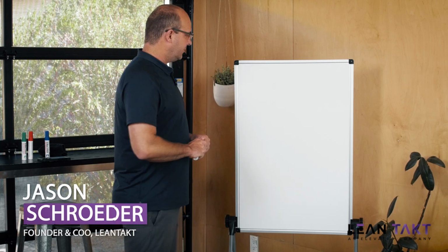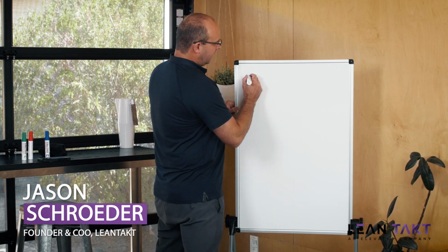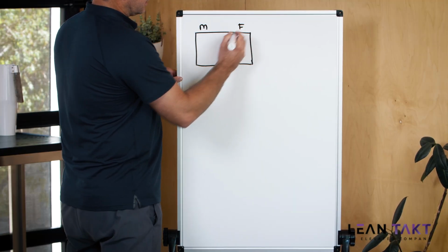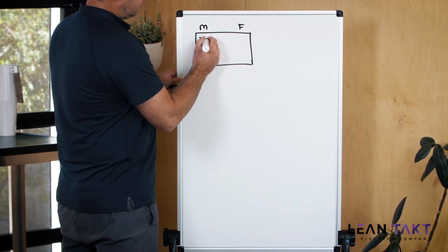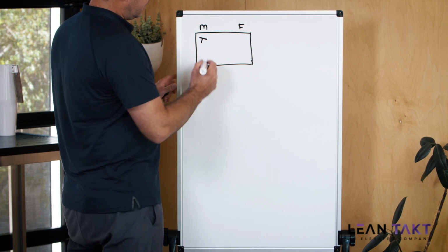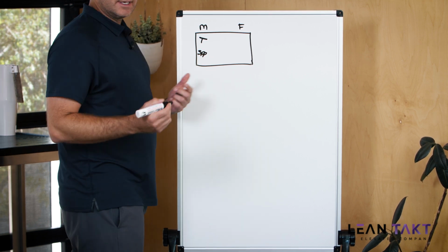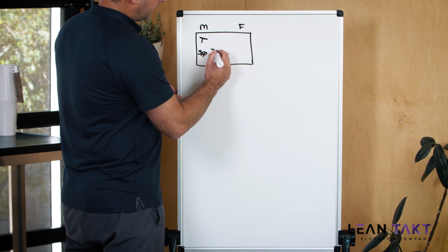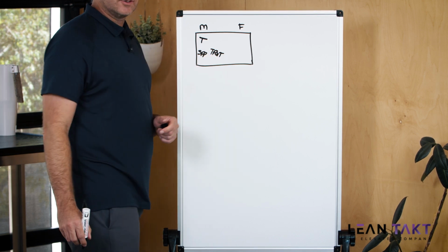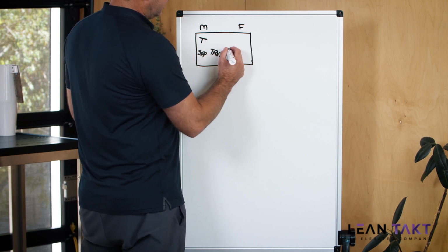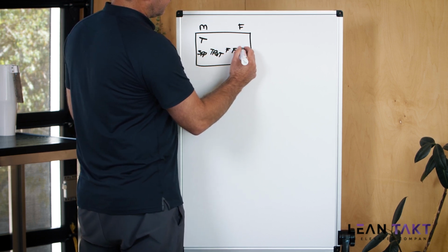Let me anchor you. If you have a meeting system Monday through Friday, you have your team weekly tactical Monday morning, your strategic planning and procurement meeting Monday afternoon, your trade partner weekly tactical where you do your look ahead plans and weekly work plans Tuesday afternoon, and then every day you can do the foreman huddle every single day.